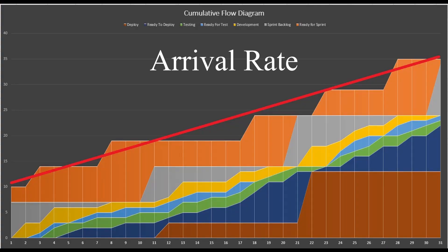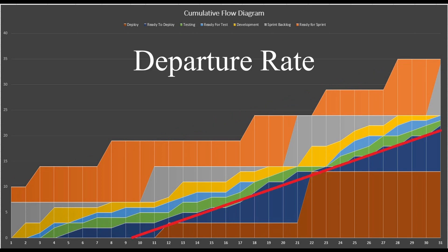The slope of the chart gives us some information as well. You can look at what we call the arrival rate — that's the slope of this line based on when things come in. We can also look at the completion rate. You can draw a line and make a projection out, and this will tell you at what point things will be done. For example, if I know I have a hundred items in my backlog, I can draw a line and safely project and forecast at some point when everything will be done.